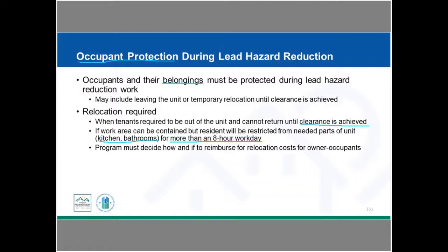We're going to be talking about, so how do we pay for this? Is this optional? So up front, the program needs to be figuring out, how will we be paying for relocation? We're going to mention that under the Uniform Relocation Act, if we are involuntarily displacing someone, such as a tenant who occupies a unit that we're doing work on, we're going to be fully covering all of their out-of-pocket costs.